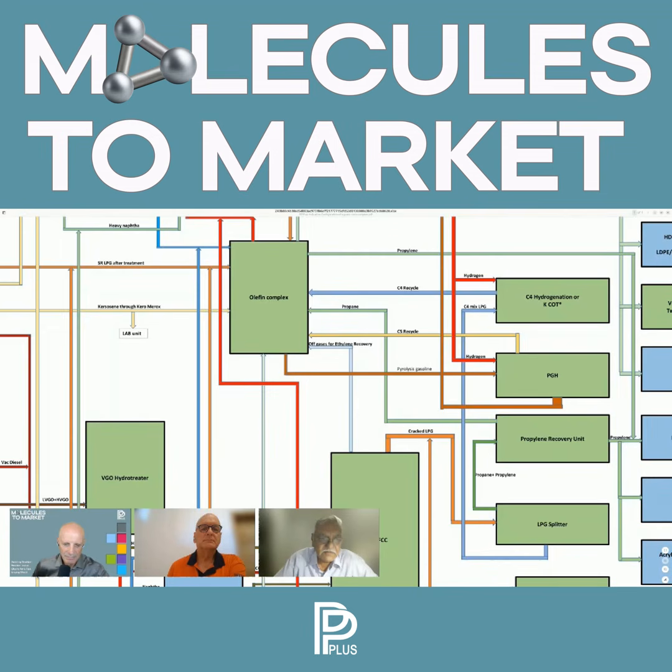But if I have to reduce my capex, the BOO part of the units will not form a part of my capex estimation. So if a particular project has the desire to reduce the capital expenditure, there could be a portion of the plant which can be implemented on a BOO basis also. There are certain facilities which can be done on BOO.